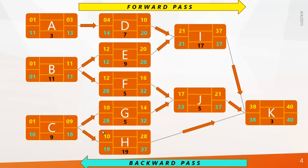Now we have calculated early start, early finish, late start, and late finish for all activities. If you're confused between early start and late start: look at activity A — you can start it on any day between day 1 and day 11, and delaying it between early start and late start won't affect the total project duration. This period between early start and late start is called float or total float — it is simply the period an activity can be delayed. To calculate float, take the difference between late start and early start, or late finish and early finish.